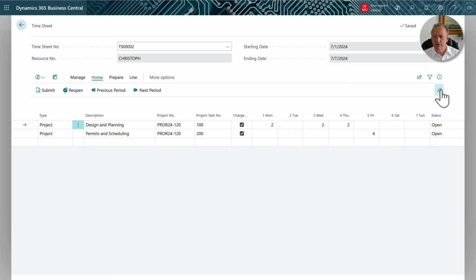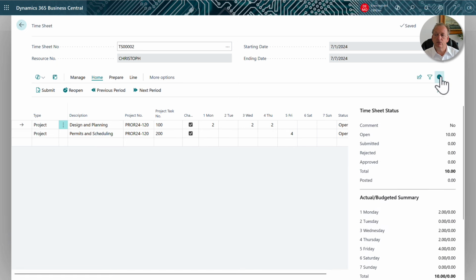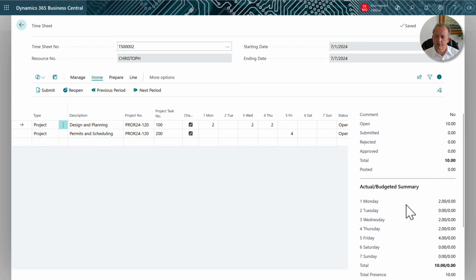And then you have the ability to see the weekly totals quickly in this summary page of the fact box side of the timesheet entry. And here you have totals by day for the whole week as a whole, and then what stages of these entries you are actually currently in. So we're starting with an open stage, and then we'll then submit our hours for our manager to review, and then the manager will reject them or approve them, and then finally they will get posted against the project in a separate posting process. So that's the basic phases you go through for these particular entries.